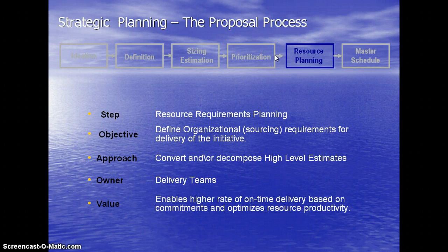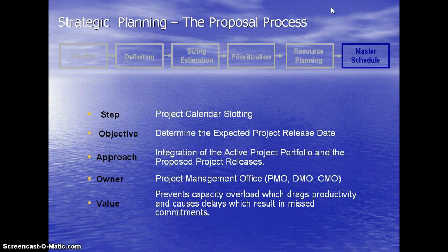Resource planning. This is the step where we go from a floor plan and lot layout to a team definition. We don't have a blueprint yet, but we take a closer look at the floor plan and wish list and determine that we need X number of framers, tile workers, plumbing, electrical, HVAC. We need to construct a skill and experience inventory and volume to complete the project. This is the critical step of demand management, but one with lots of feedback for improvement. We have to define how many developers, architects, testers, trainers, and how much time each will require. The value and utilization is obvious in the next step.